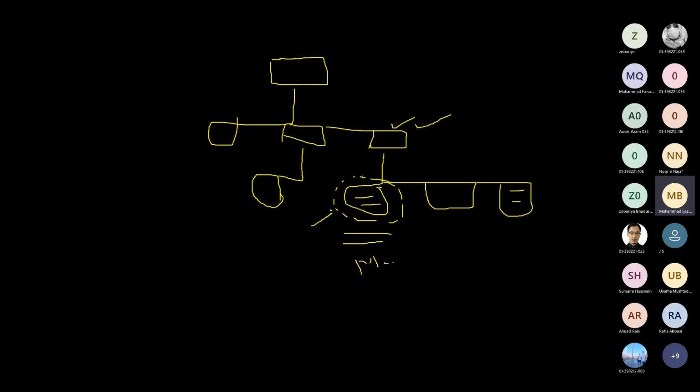This work should be completed in 4 to 40 hours. And if it is a large project, this work should be between 8 to 80 hours. But the main theme is you should keep breaking it down to a level where you can easily plan it, manage it, and control it.